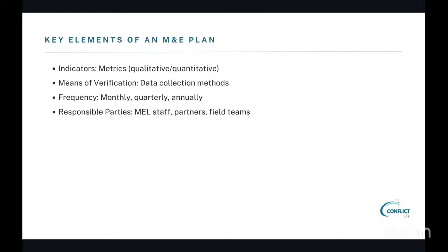You can have a pre-project survey where you have data to show that the malnutrition rate is X percentage in Z country. But then you have to show that you are going to do a mid-project survey and a post-project survey to show that there has been a decrease.